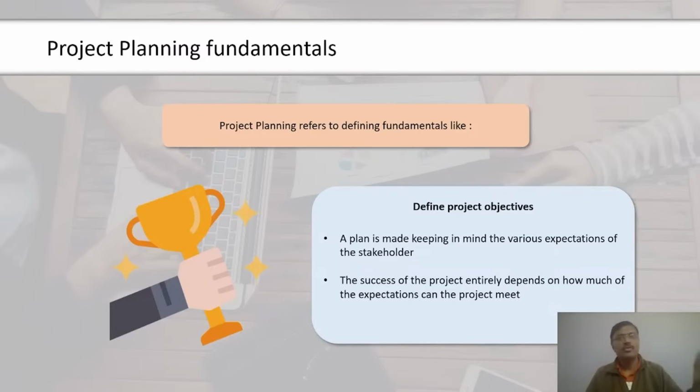Program evaluation and review technique is based on 3-point estimates for an activity. The pessimistic estimate refers to the worst case scenario, whereas the most likely estimate is what you expect to happen in a realistic scenario. The optimistic estimate, on the other hand, represents the amount of time an activity would take in the best case scenario. Based on these three estimates, the expected duration of the activity is calculated as per the formula given on screen. The formula for calculating the standard deviation of an activity and the variance of an activity is also given.